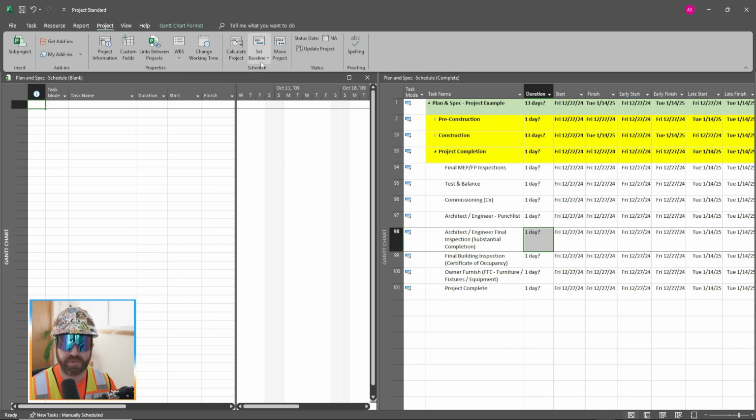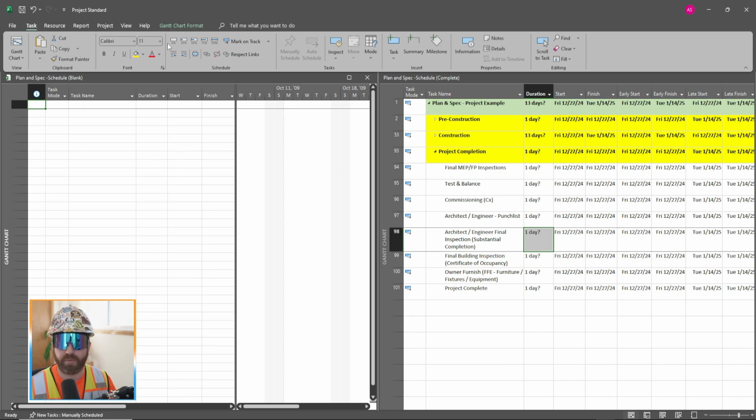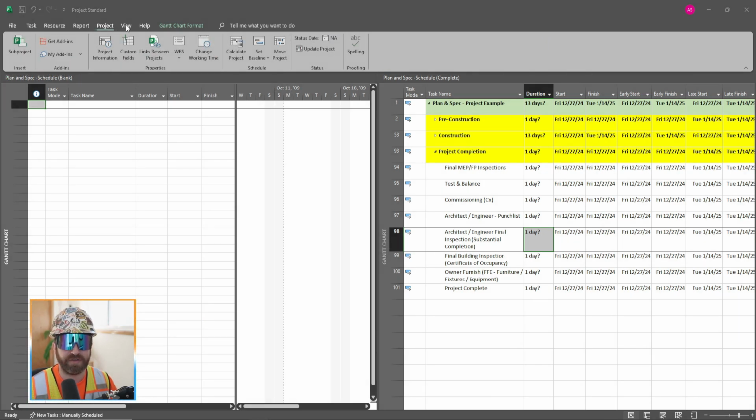Finally, we have project baseline and status date. So this is what we would use to track progress against the initial project schedule that we're going to set up in this video. This also requires its own video. This is when a project is ongoing and say you're a month into the job and things are progressing along, you would use this baseline status date along with, under this task tab, marking kind of percentage completion on certain tasks or activities.